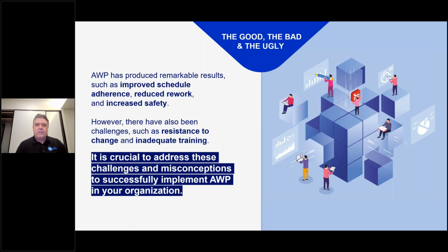So we've seen projects, some of the other examples of where things don't go so well is this idea again that, well, I'm going to front load all my plans, and then engineering and procurement can just operate according to that. Engineering and procurement has different dynamics. They aren't done in the same sequence that construction's done. So thinking we're going to have it dictated over is also just a fundamental philosophical mistake that has been misunderstood by a number of those in the industry, including members of the lean community, who somehow said this doesn't work. Well, it was a basic misunderstanding.